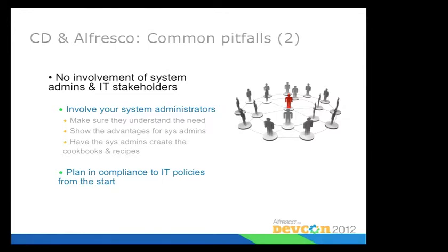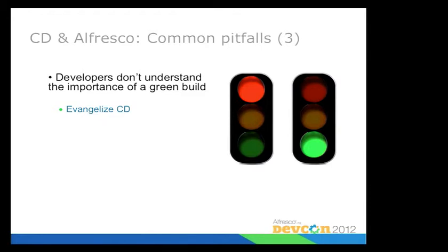There are also IT policies and compliance things that you might want to check before you start. Doing it afterwards is usually a big effort. Just an example here, we had a customer who only runs HTTPS at port 1000, I don't know what. If you don't have a configuration for that, if your scripts cannot deliver that, then you have a problem. So always check what you need to support.